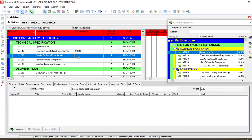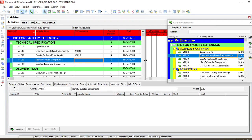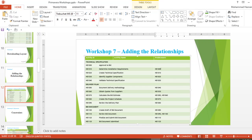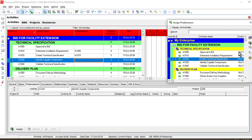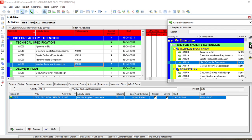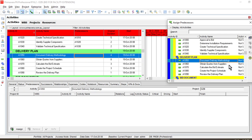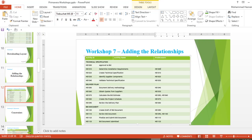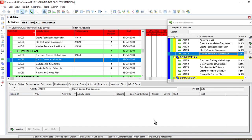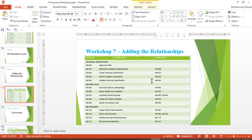Similarly for each activity, you will assign the predecessor by mentioning it here. One important thing: if you try to make 'Document Delivery Methodology' the predecessor of itself, you can't do that — an activity cannot be its own predecessor. Just add the predecessors according to what the presentation is showing.